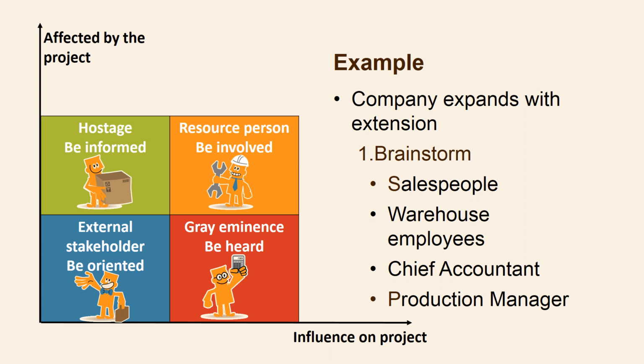It was originally planned that the production department should move into the new building. This has changed. It is the warehouse department who is going to move into the new building. The production department will expand into the free space in the old building left behind by the warehouse department. This kind of decision requires agreement from the production manager. It can only be achieved if he is involved in the project, so that he takes part in the decision.